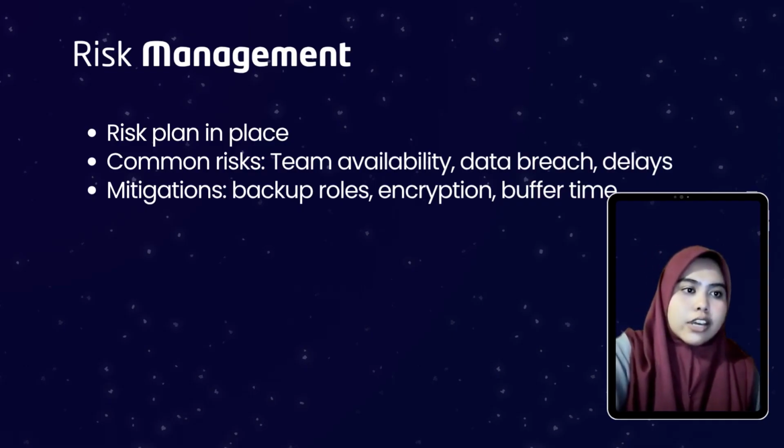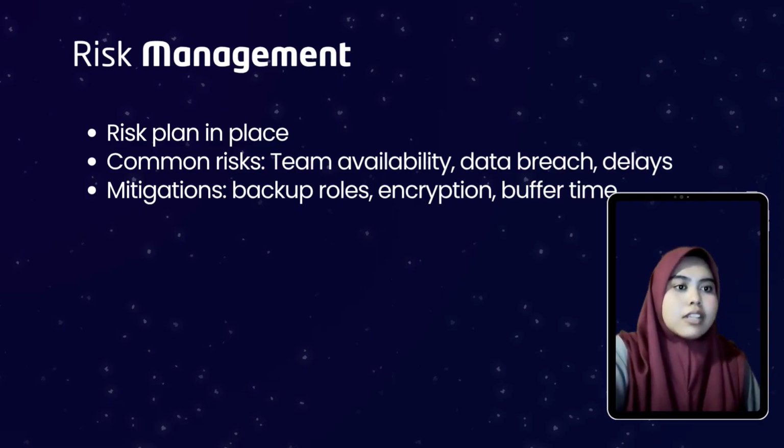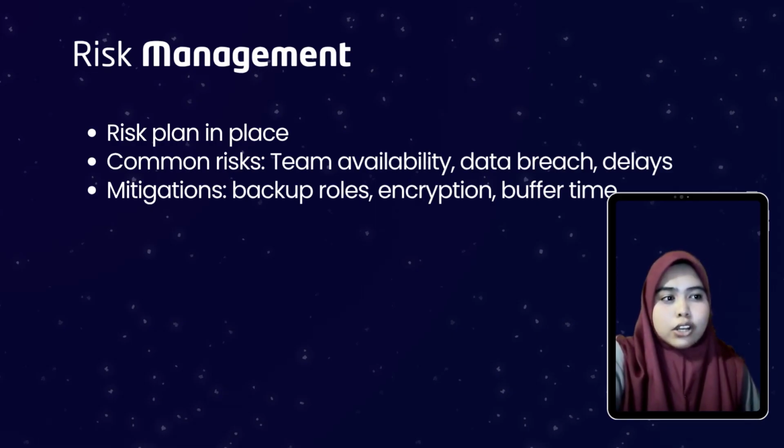Another one is development delays, which we manage by adding buffer time and focusing on core features. Next one is security threats, which is mitigated through secure logins, role-based access, and HTTPS encryption.